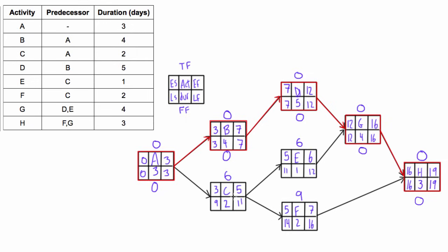For activity C, it has two successors, so we choose the smallest early start among them — they both happen to have the same early start of 5. So we get 5 minus 3 minus 2, giving C's free float as 0. For activity E: 12 minus 5 minus 1, so it has a free float of 6. And for activity F: 16 minus 5 minus 2, giving a free float of 9.